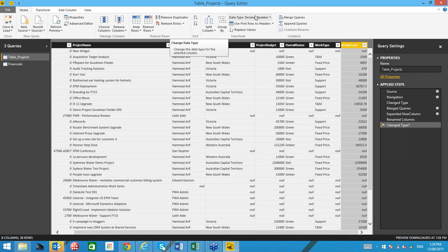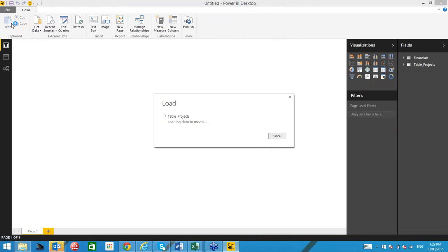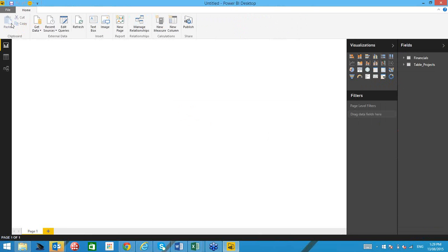So this was the data transformation part, and now I will show you how we can create a report out of this. My data transformation is done, and for an enterprise Power BI suite, I can schedule this activity to be refreshed every hour or every day, so the latest data will be loaded every time that somebody runs the report or on a schedule. So in my report designer, I will start using this data.